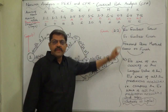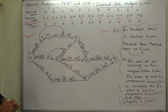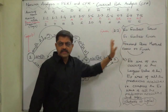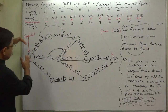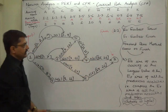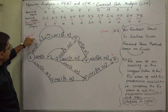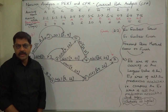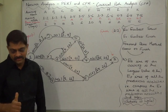So we follow the forward pass method — this method is popularly known as forward pass. From start to finish we go forward, and we determine the earliest start time and earliest finish time of each activity. I hope you are able to understand everything. Thank you very much.